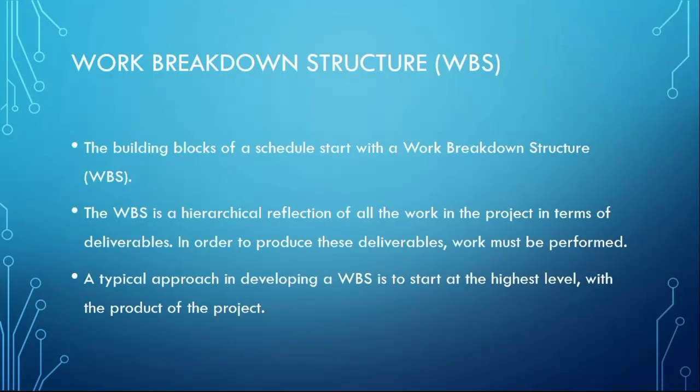Under that, what they call now the foundation. Foundation is a task already on its own. The foundation makes up the initial phase. For you to be able to achieve that foundation, which is a task, you need to break it down further into smaller sub-tasks or sub-units. That's where work breakdown structure comes in. So when I break that particular task of laying foundation into smaller tasks, so that I'll be able to manage it or be able to deliver it, what I've done is what we call work breakdown structure.